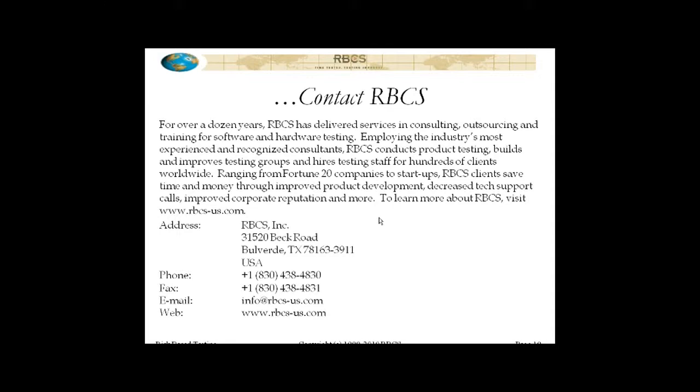And then periodically at major milestones, such as approval of the requirement specification and the finalization of the design specification and completion of implementation and unit testing, and then after the first, say, 25% of test execution, at these periodic intervals you're going to look at the new information that you've got and then adjust your risk analysis, add new risk items, adjust likelihood and impact for existing risk items, reprioritize your tests and so forth.